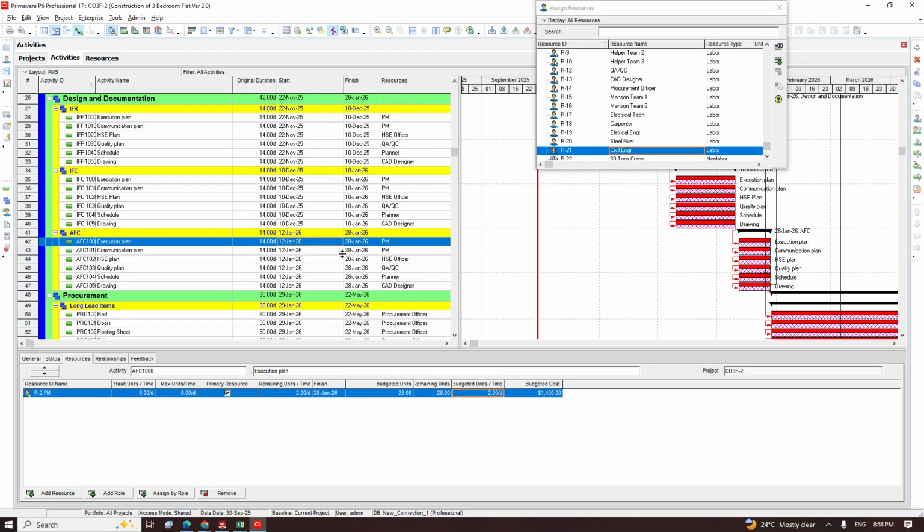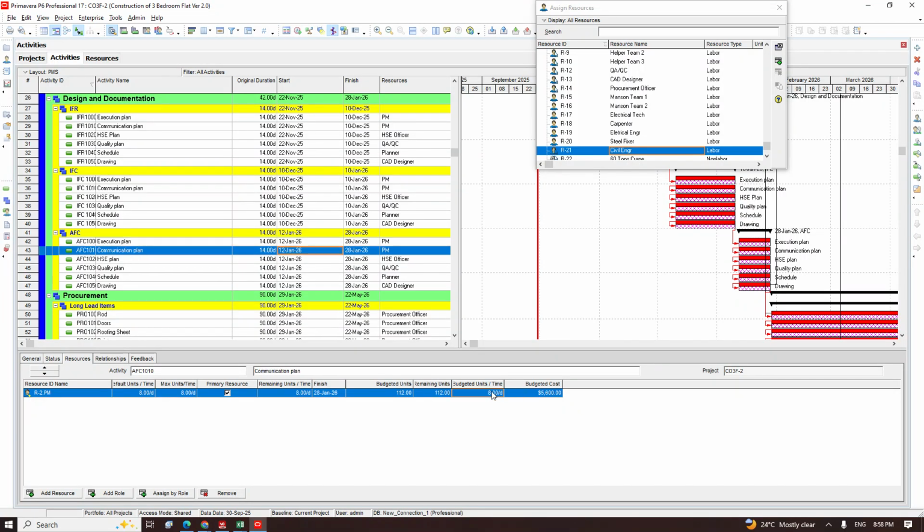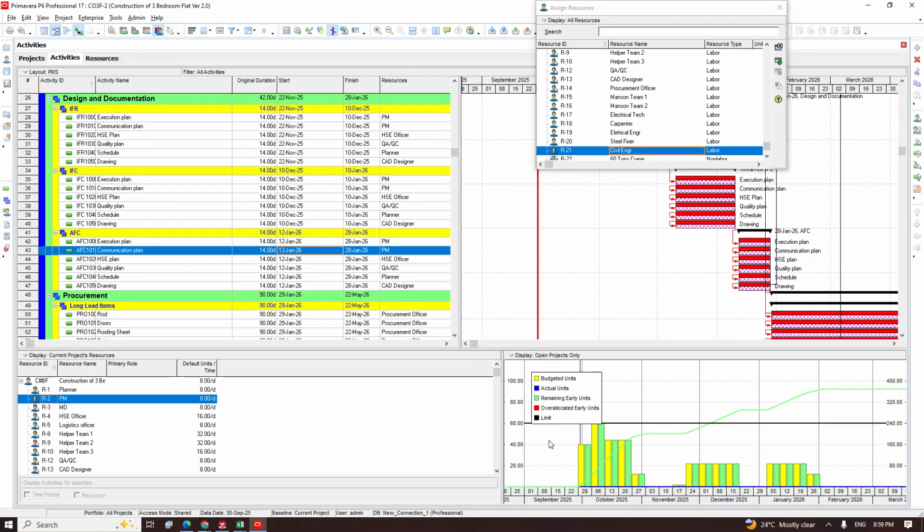So now, but if a situation whereby PM must work 8 hours, that brings the concern of what we need to bring in another PM. It means this PM cannot do that job alone. That's where we get to know that you can see it. PM now is okay, is maximally okay. So this is how we monitor overloading.